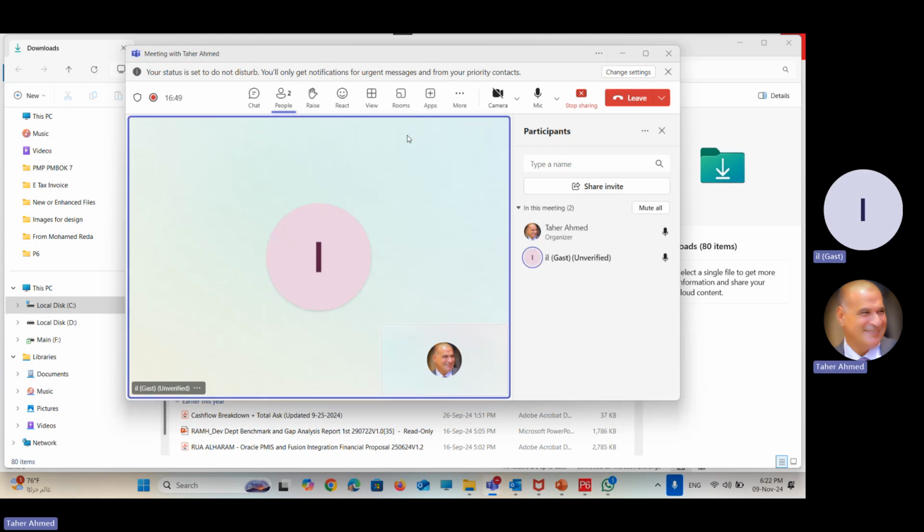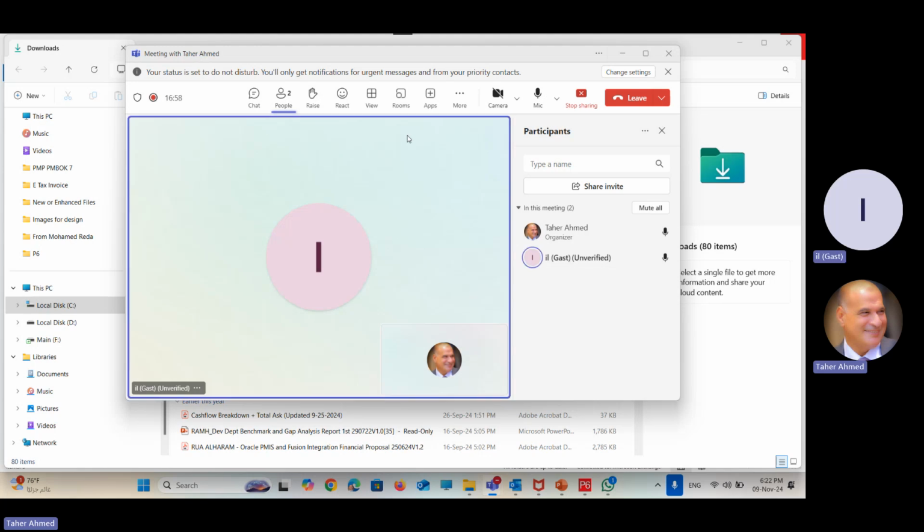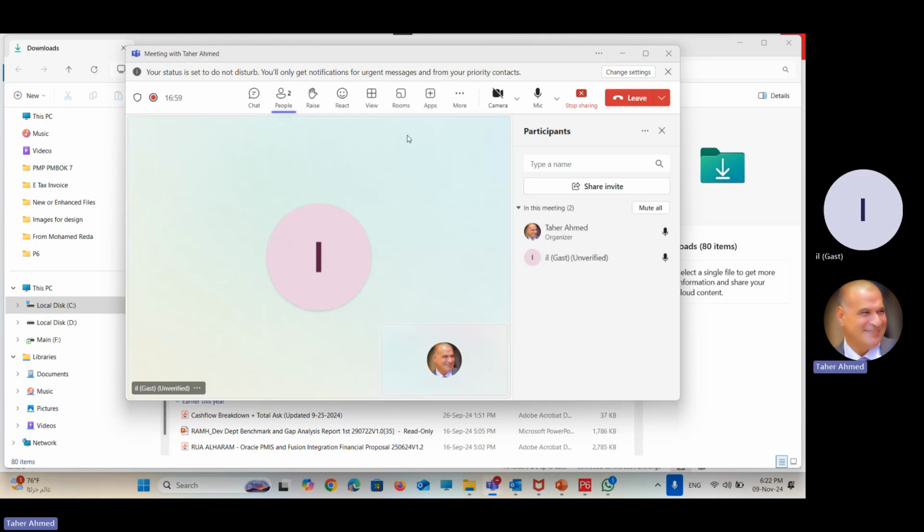After we knew how the layout works, we moved to calendars. We learned how to create a calendar. We understood yesterday that we have three types of calendar in Primavera: global calendar, project calendar, resource calendar. And when we say project calendar, it will be active only when we open this project. Without opening a project, we cannot add a project calendar.